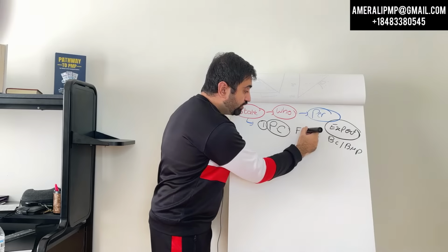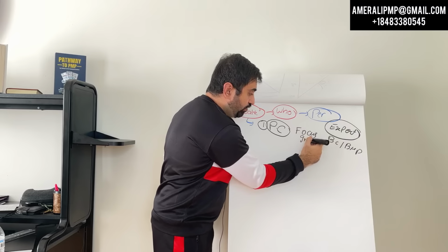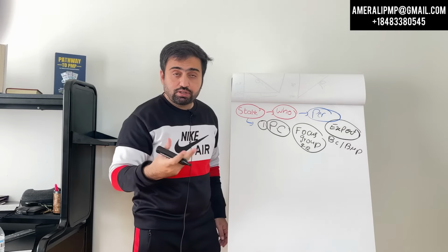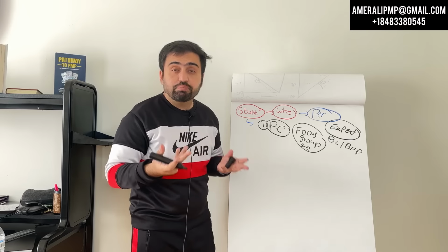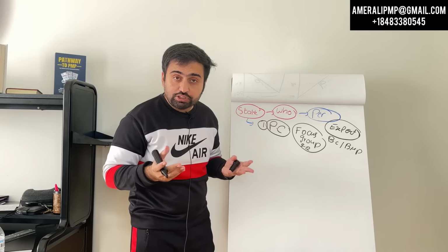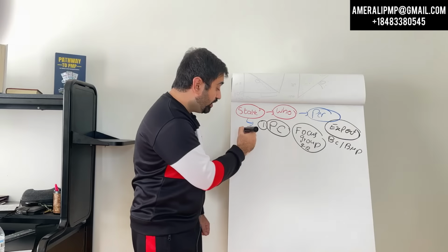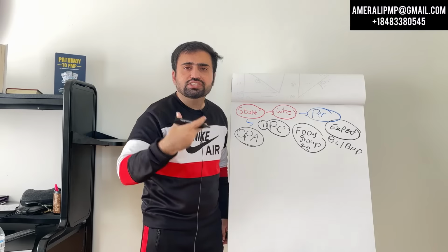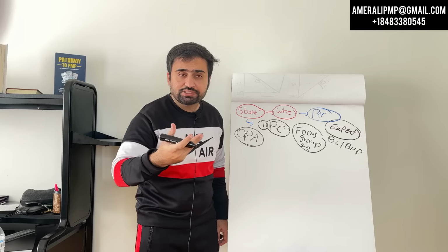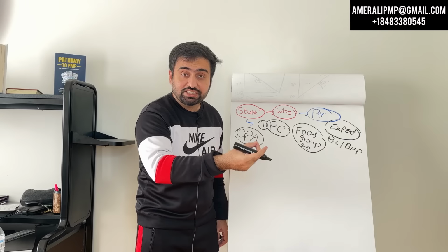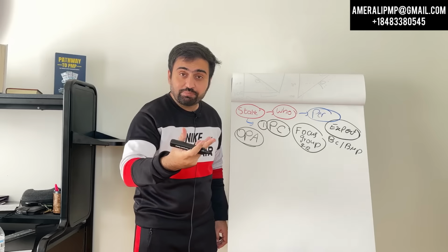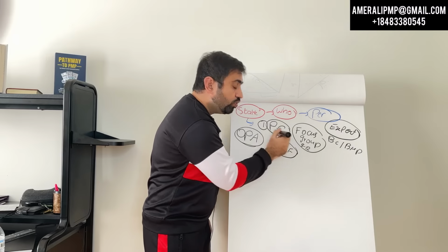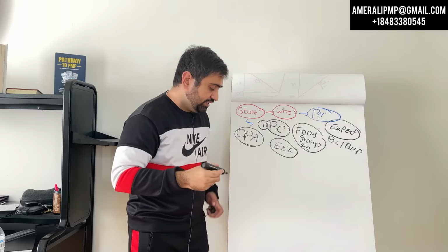Now we will have a focus group meeting with them. A focus group is normally 8 to 12 people, so key people are there in the meeting. You identify more stakeholders. Maybe you can have a workshop. In addition to that, you will look at your organizational process assets, OPAs: the policies, procedures, tools and templates, past lessons learned register, to see who the stakeholders can be. And very important, you will see enterprise environmental factors: who are the internal stakeholders and external stakeholders.